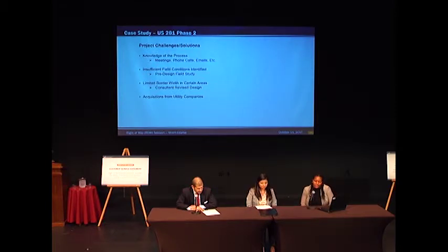And acquisition from utility companies tend to be a little bit more difficult than usual when they're a fee acquisition. In this particular project, we had one parcel that was owned by the city through the utility company, and I learned something from Sharon's presentation today. We might have to call and get some assistance for that. But we were having problems on this particular one. They would be 100% covered for the utility relocation, but they still didn't want to negotiate for the fee acquisition. So this is one where we're not completely finished and we're still looking for creative solutions, but it's something that we've all brainstormed together to come up with ideas for how we can handle it in the future.